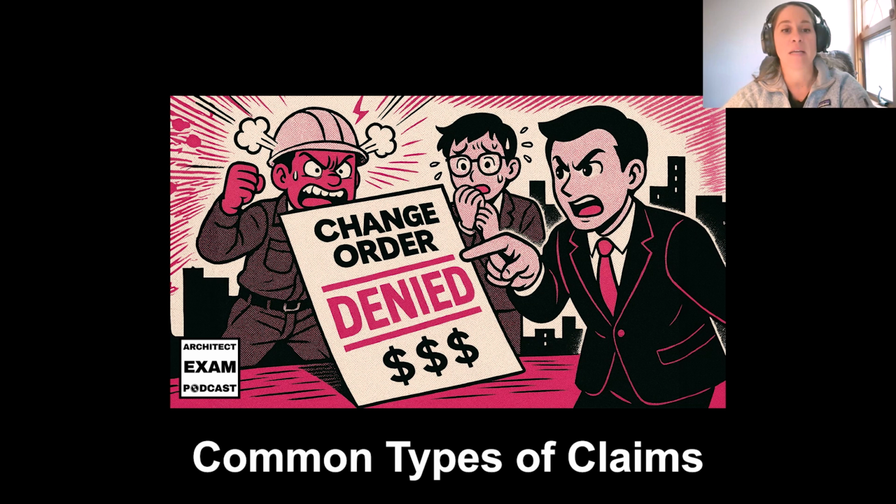Owners can also have claims against them with site access issues, which include restricted work areas or maybe parts of a job site that a contractor couldn't get access to because it was closed. This can cause coordination problems with existing operations, or maybe inability to fairly assess the site because there were undisclosed site conditions. So this can be an issue that the owner, again, would be causing on the project.